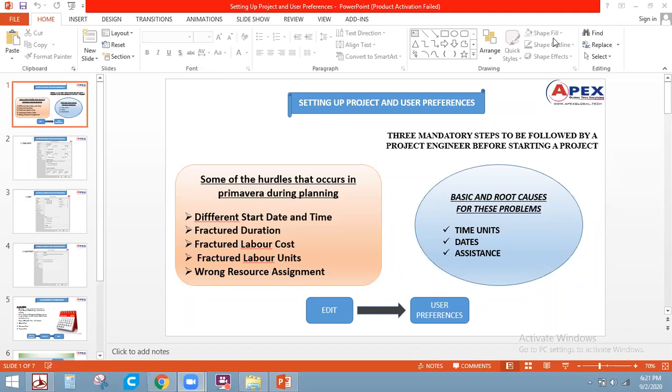Because the cost of a bhisti is around 300 rupees. The cost of other labor, considered for masonry work, will be around 600 to 700. If I assign that labor in place of the bhisti, who is the person who will secure the columns and do the curing, in those cases the entire project cost will be affected.